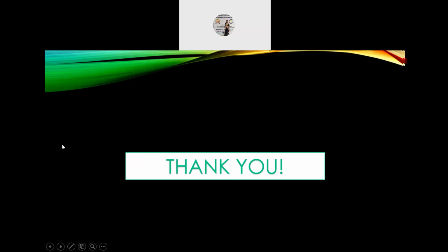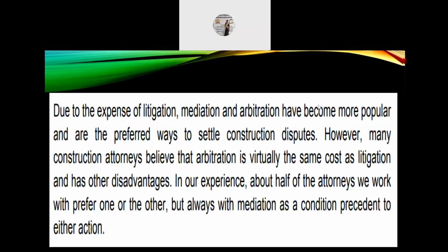Due to the expense of litigation, mediation and arbitration have become more popular and are preferred ways to settle construction disputes. However, many construction attorneys believe that arbitration is virtually the same cost as litigation and has other disadvantages. In our experience, about half of the attorneys we work with prefer one or the other, but always with mediation as a condition precedent to either action.